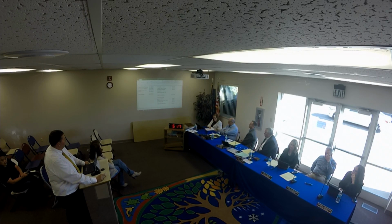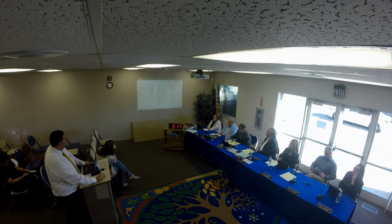So there are three items that we have alternate bids on that right now are not built into this budget nor accounted for in this funding gap. And that is the security fence that would go around the parking between the police and fire stations. The parking lot would be built, but right now we don't have it funded to put a security fence around it. And then we've talked about a west access for fire trucks coming off of 200 South, west of the building. That would really be a second access, which would make it easier for the truck to come in, pull in, and then just turn around and make a right turn right into the bays. And so when we talked early on about the development of this project, that was one of the things that came up that would be nice to have. Is it critical to open the building? It's not, but that would be a nice thing to have if the money were available.